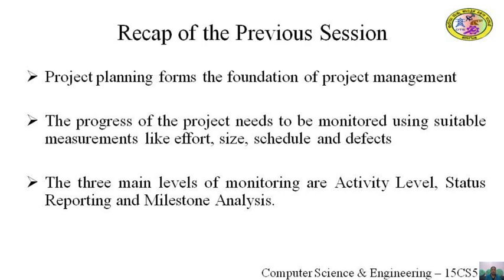The milestone analysis is done at each milestone or every few weeks. Milestone analysis includes analysis of actual versus estimated effort and schedule. If the deviation is significant, it may imply that the project may run into trouble and might not meet its objectives.